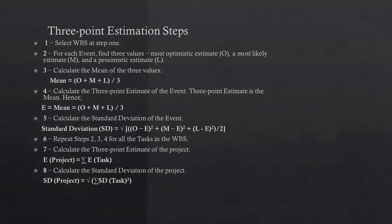Step 6: Repeat steps 2, 3, 4 for all the tasks in the work breakdown structure. Step 7: Calculate three-point estimate of the project, that is E(Project) as sum of E for each task. Step 8: Calculate SD(Project) as the square root of sum of SD(Task)², and you will get the standard deviation.